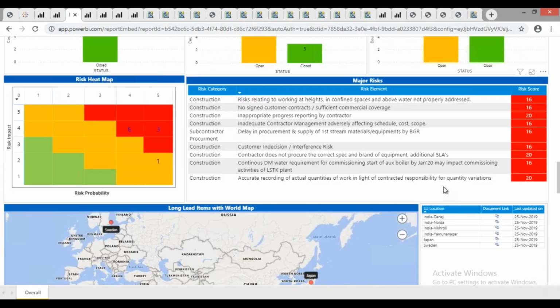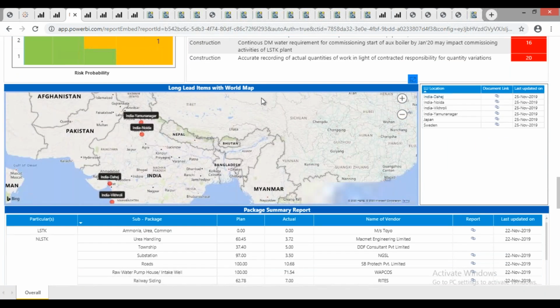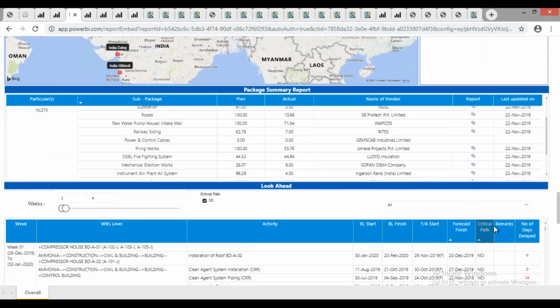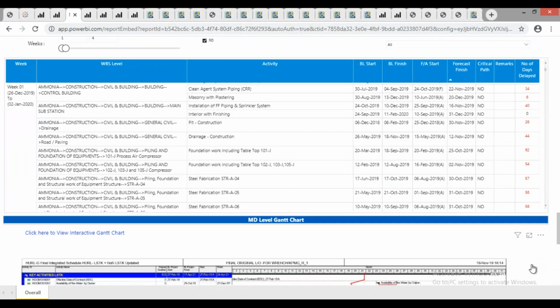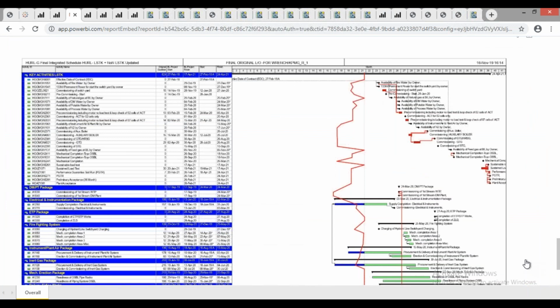And when the respective activity is done by that resource, it is flowing through the process of the quality procedure, which is defined here. And in the process, the reporting system will say what was planned, what was actual, and you will be able to see how your project is progressing. And as well as, what you see here, this is a delay chart which shows you, the central line shows the timelines. So on my overall project schedule, I can see where I am deviating from this.